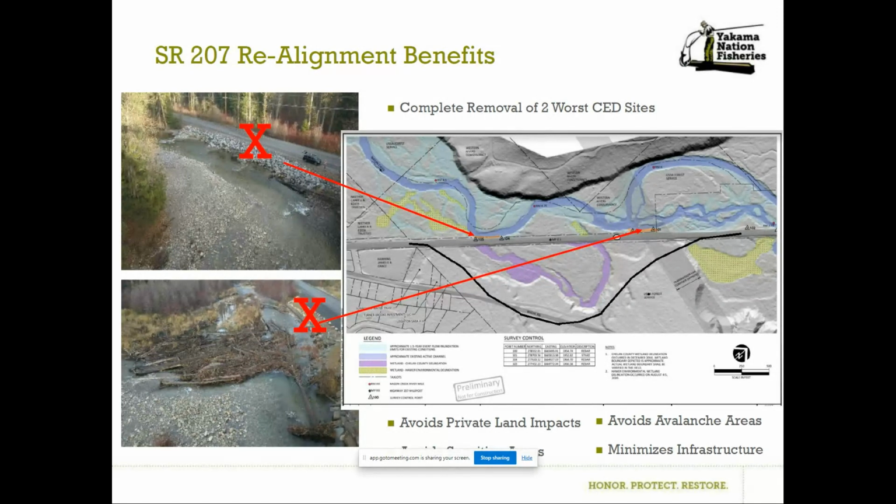But it's hard to design phase 2 if you don't know if you're going to accomplish phase 1 or not. So as soon as we're really certain, then we can move forward with realigning this highway. We're going to be developing the rest, in-stream and side channel restoration prescriptions for the remainder of that zone. That is the phase 2 project.